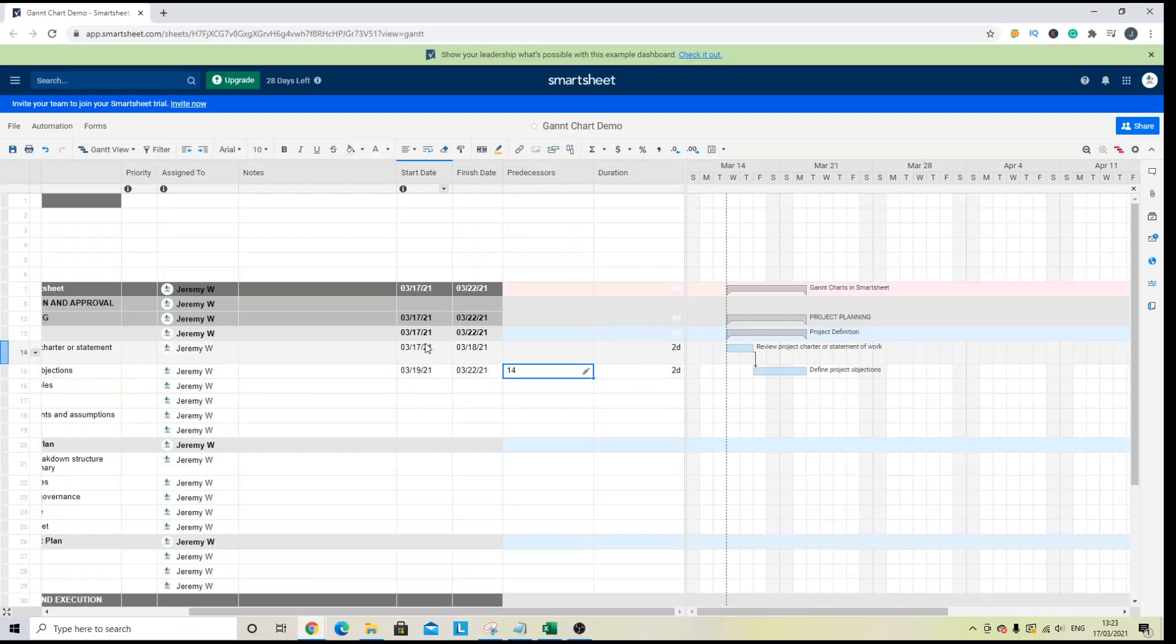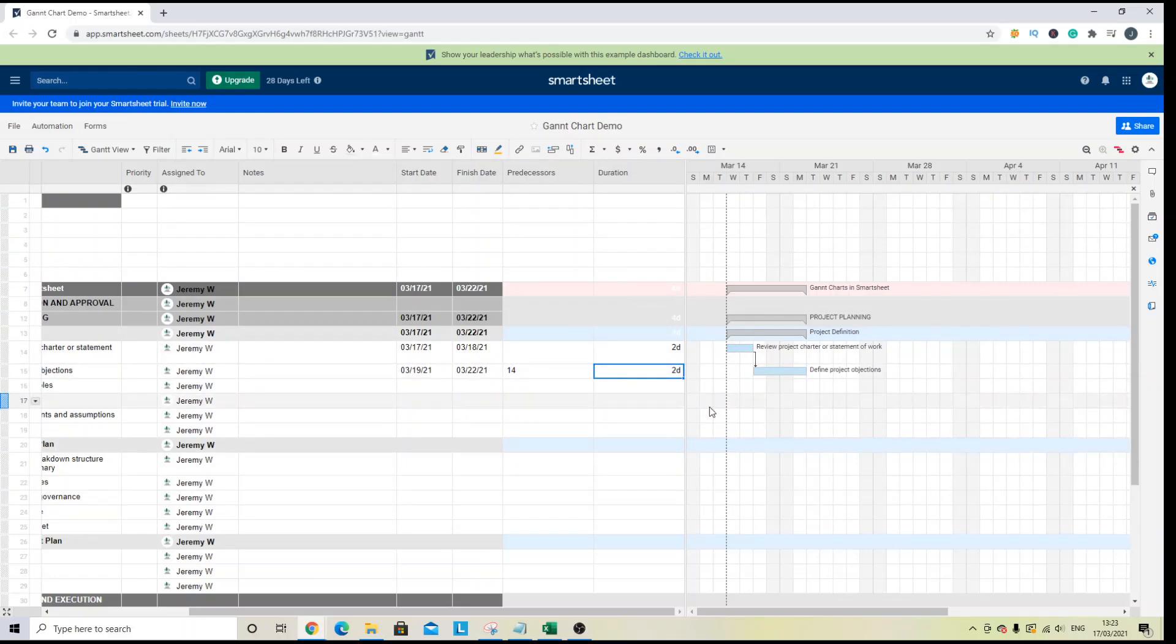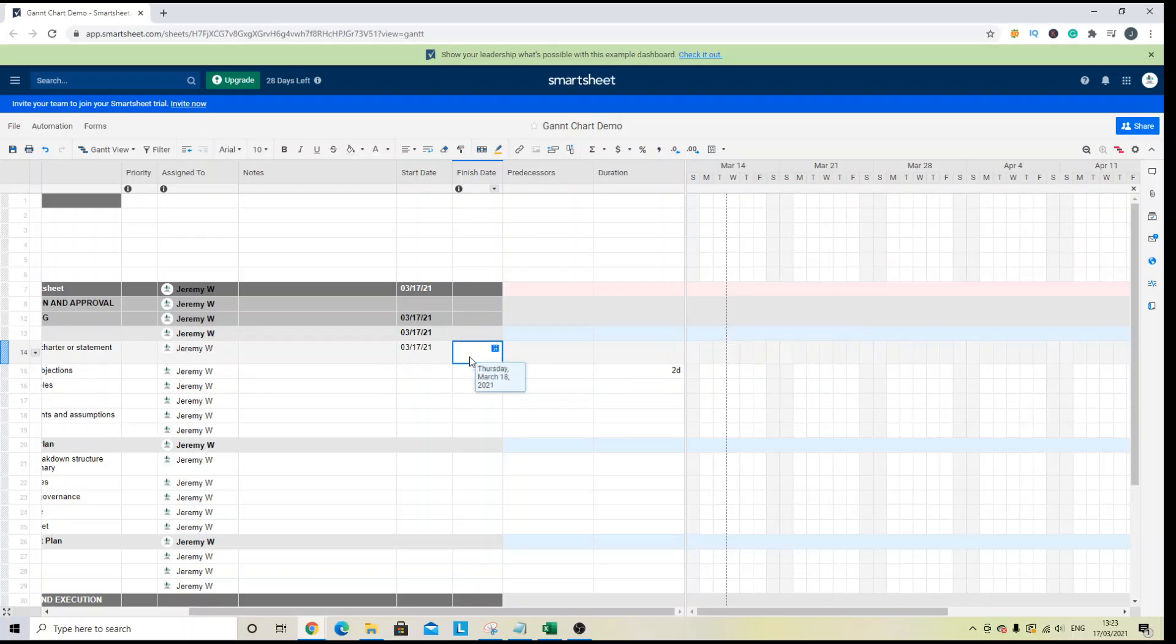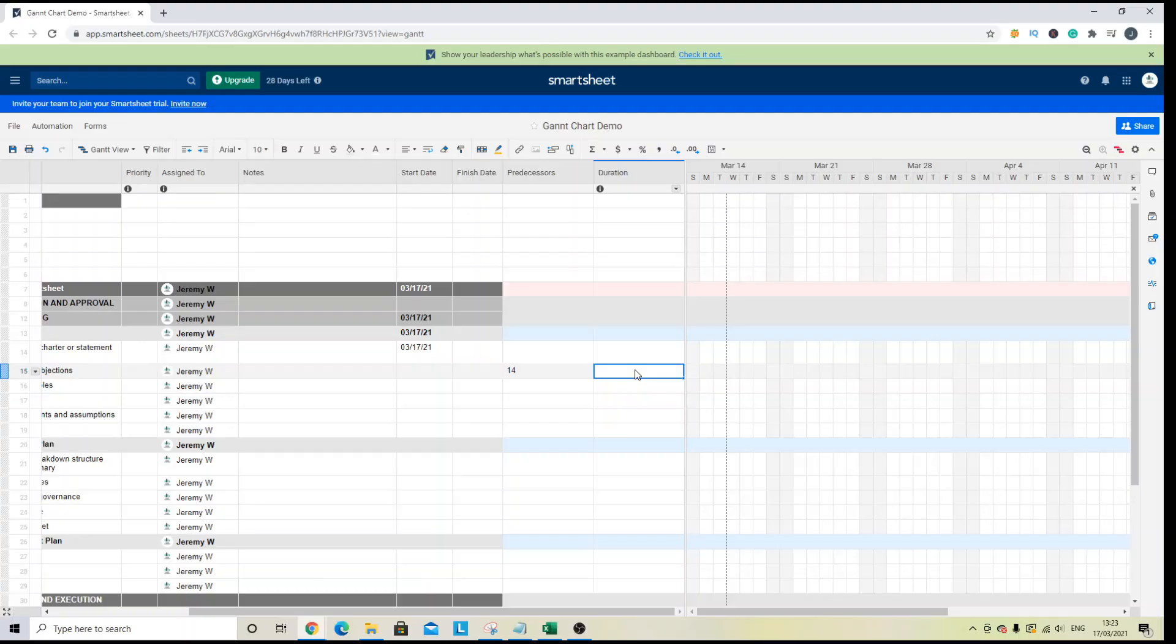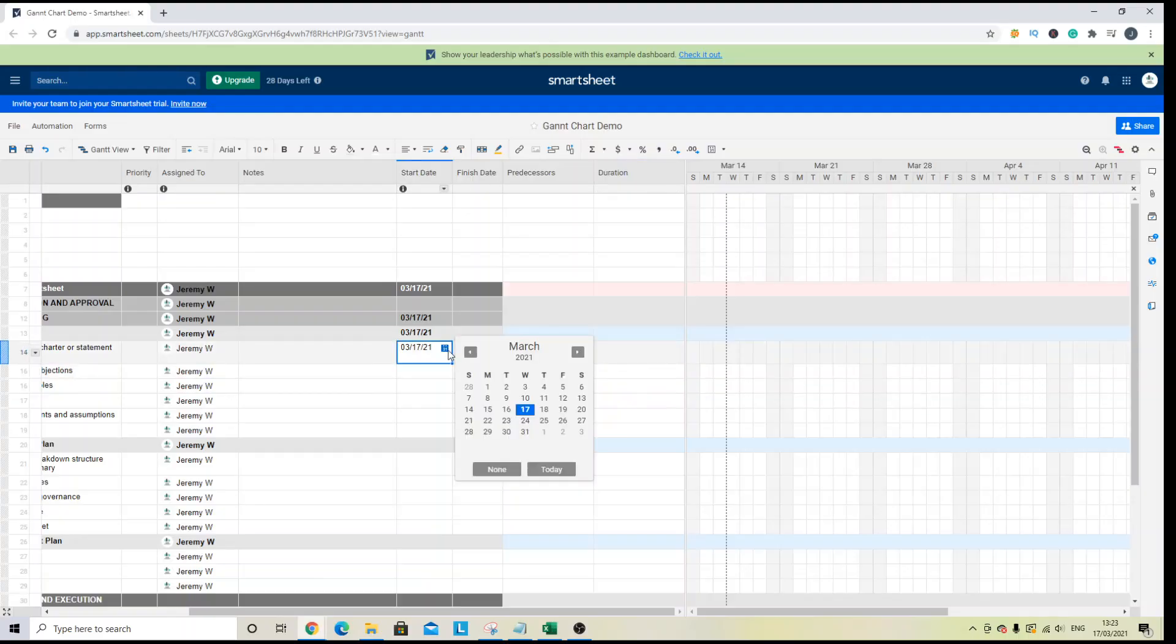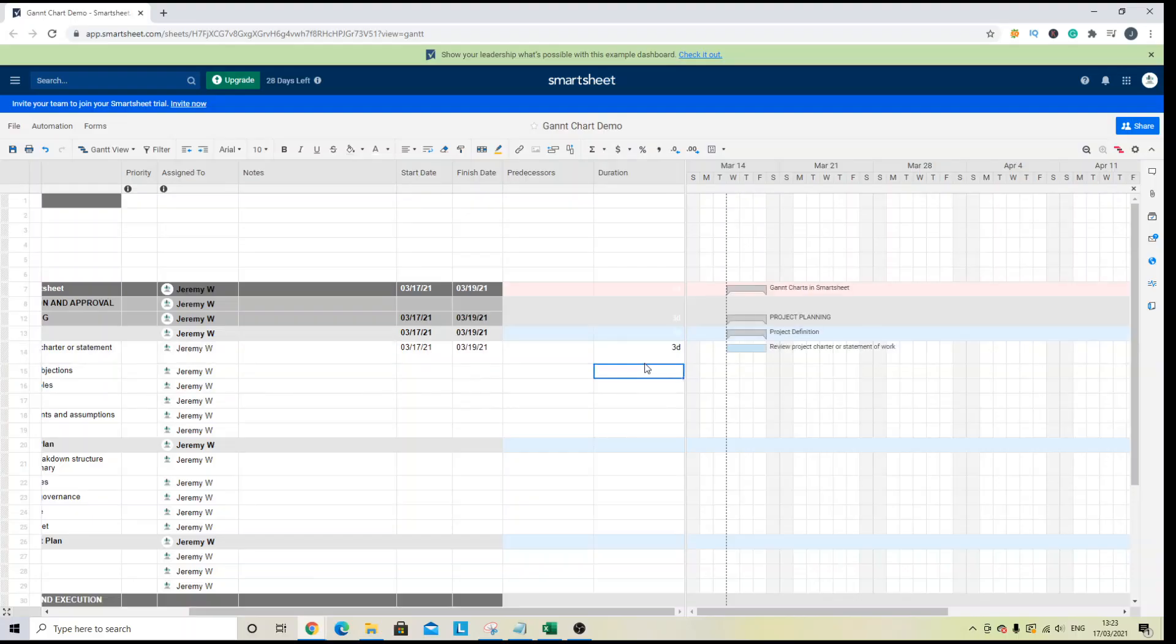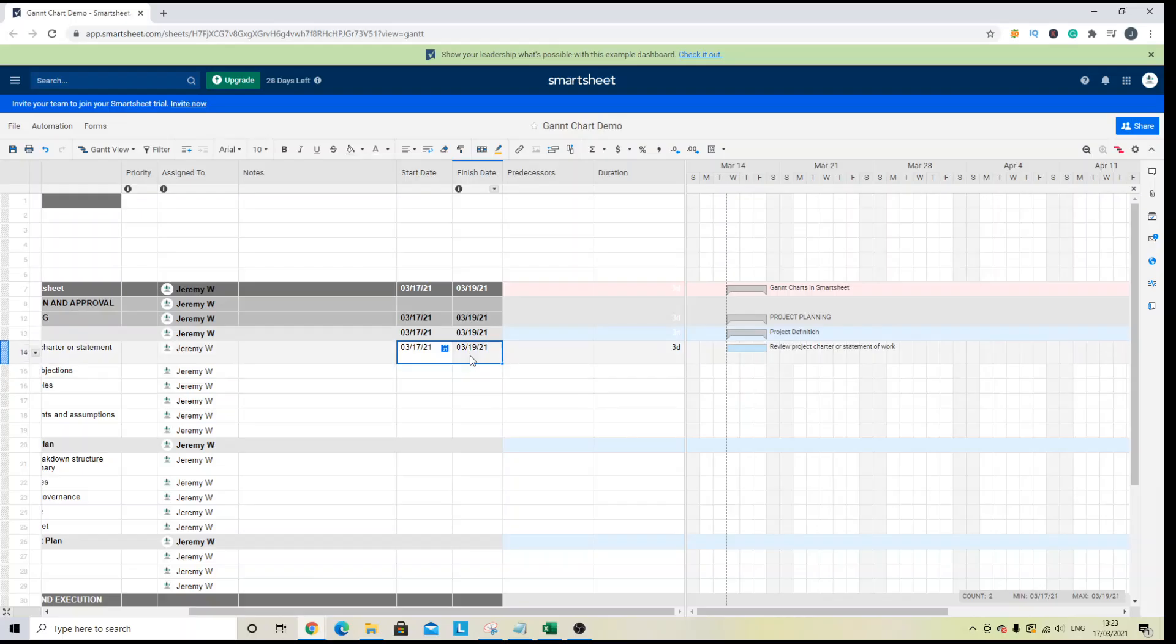Now, another thing you can do to update the dates and make the Gantt chart update automatically is you can use the duration column. So let's take out everything we've got in place here. So I'm saying that today's date, 17th of March, is the start date. Well, if I put three days in here, you will see that the end date has automatically updated for those three days and the Gantt chart has populated accordingly.